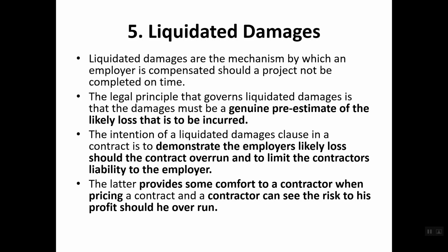And on the other hand, when you are going to claim that liquidated damages, you should make sure that the delay has happened totally because of the fault of the contractor, not because of you. If it happened because of the fault of the employer, then you cannot claim liquidated damages from the contractor. Then you have to grant an extension of time. It means if the project was delayed because of an error of the employer or the engineer, then the contractor is helpless, and you have to grant some additional days to that particular person. So in that case, you will not claim liquidated damages. Liquidated damages will only apply where the contractor was not successful in completing the project on time.